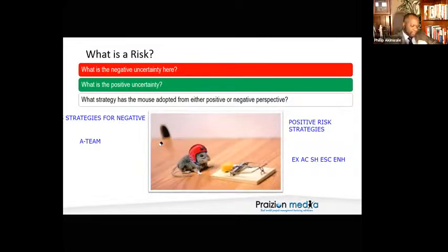It says the most active acceptance strategy is to establish a contingency reserve. Do you see why, when I said contingency plan or whatever, it falls into accept? Bear that in mind, including amounts of time. So saying, oh, I'll put aside some time to deal with it, or I'll put aside some money or resources, it is all accept. Do not be deceived into thinking it's mitigate. It's a cheap trick. It's been a cheap trick for many years to deceive students that putting aside more resources or money if the risk occurs.